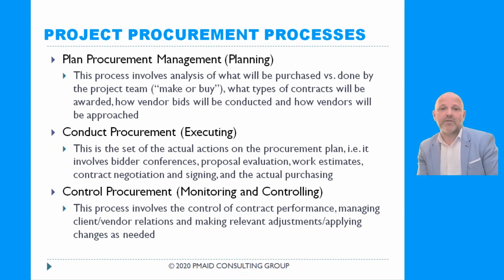Conduct procurement, an executing process. This is the set of the actual actions on the procurement plan. So we have the procurement plan, we act on the plan. It involves bidder conferences, proposal evaluations, work estimates, contract negotiation, and signing the actual purchasing. Of course, not all of this applies for every particular project, but some of it may apply for one of the projects that you manage.